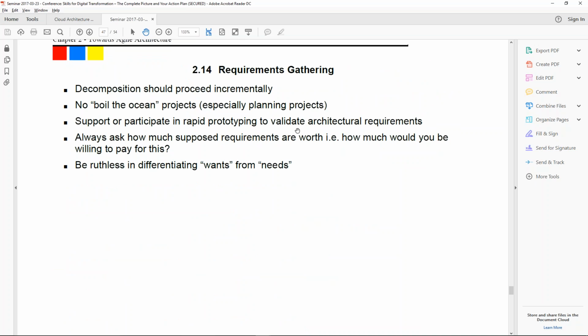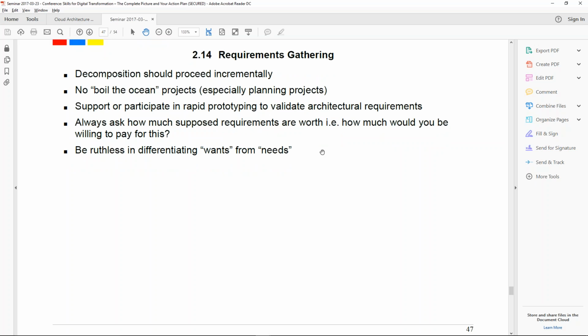Requirements. Generally, we gather requirements as we go. A lot of folks have a lot of requirements way, way early. That's fine. But over time we have a wish list that is far longer than what we can actually accomplish, and people are prioritizing their requirements. In general, Kyle's answer to requirements in an Agile world is, so long as you have 3 or 4 times as many requirements as you can actually get done, you're fine, because then people are forced to prioritize.